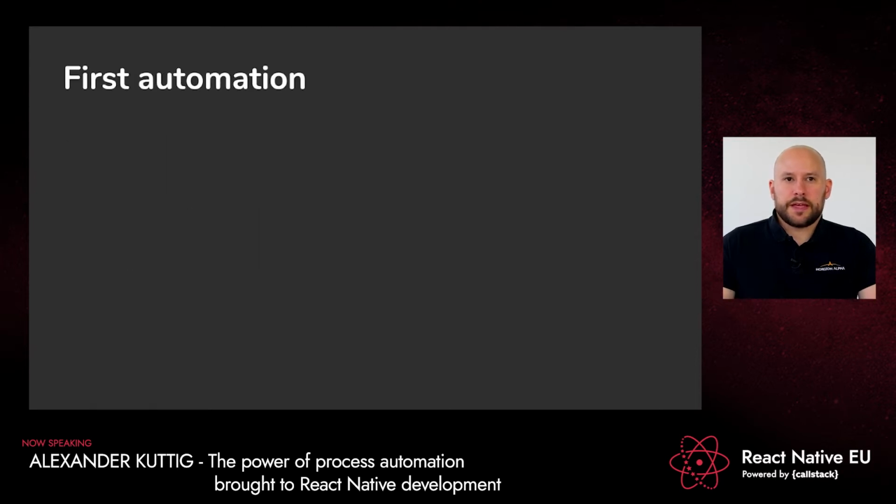So again, information, very important for us. So we at first started to automate the moving of the issues. Every time an issue branch is created, we move the corresponding issue in the Jira board to the in progress column. This is very easy, it saves some time because the developer doesn't have to do it by hand.